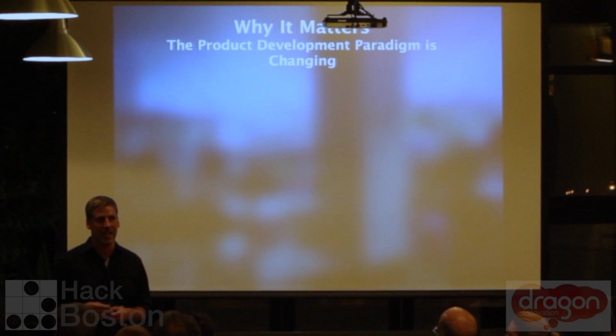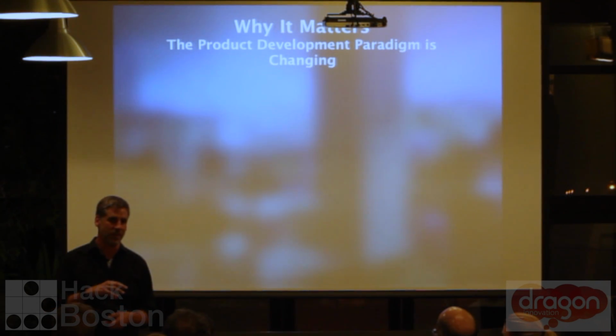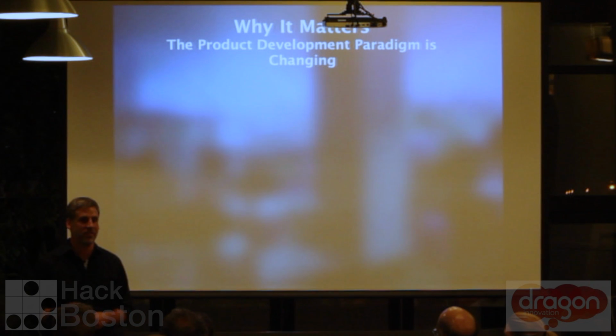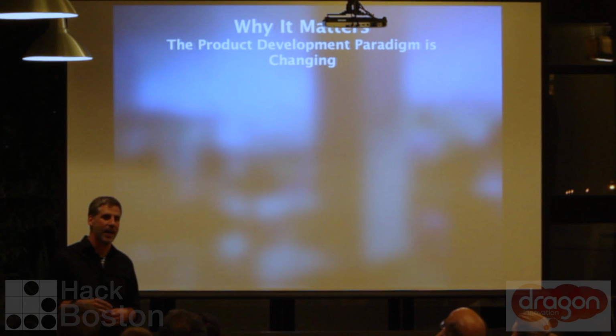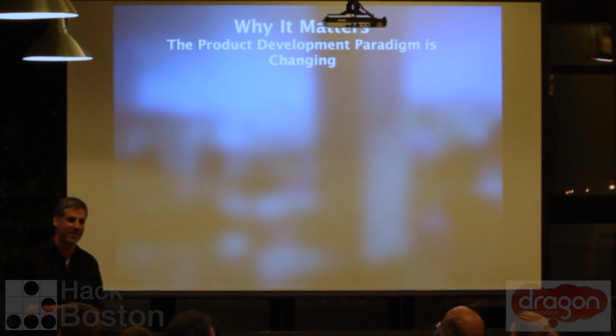But it's almost like every one is a unique situation. And there are different categories of failures. The best failure in the world is one that affects 100% of the units at 0 hours. The worst one, which we've seen and cost us many days of sleep, is the one that happens after 40 hours in 1% of the units, because it's just super hard to fix. And Daniel, who's in here, solved a mechanical problem in software, saving us reworking. We still had to rework 50,000 Roombas, which is more Roombas than would fit in here. But it was one of those failures, like the intermittent after time. They're a nightmare. But you do see really weird stuff. Like we see a lot of multi-layer capacitors crack, and you get a low current leak or things like that, which are just sort of a bear. Yes, but quality is a really big deal.